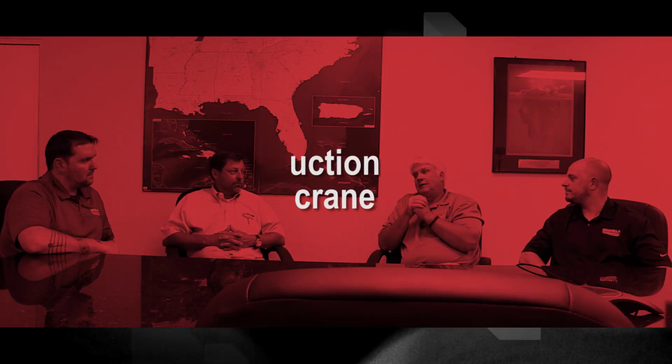We used to have a standard scope of work, but approximately 5 or 6 years ago, we started really homing in on, hey, here's what we're doing. We're going to deliver the crane, we're going to unload it, we're going to move it in, detail by detail, and really be specific about what we're doing. So there were no hidden costs, no misunderstandings. We're still going to run into an occasional one, but it's been much more beneficial for us doing it that way than just saying what we used to say, which was one lot installation.